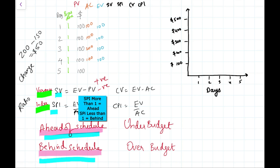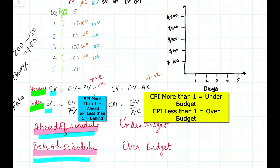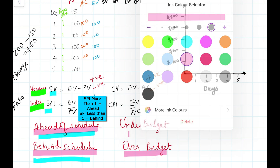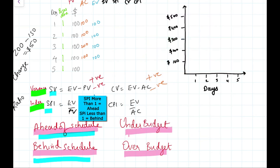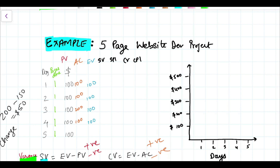Similarly for cost: CV is cost variance. If the cost variance is positive, you are under budget — you have more money. If the cost variance is negative, you are over budget — you have less money. The same logic applies to the cost performance index: positive means under budget, negative means over budget.